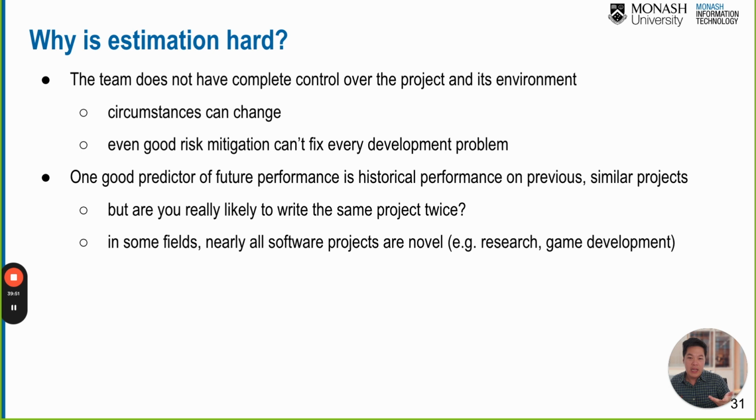So there are lots of factors that can impact the estimation, and at the end of the day, we still need the estimation anyway, to measure the velocity or the speed of the development timeline, whether we are on track, or behind, or quite far ahead of time, right?